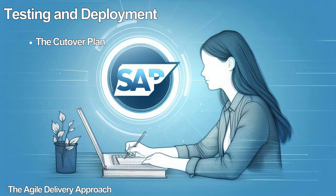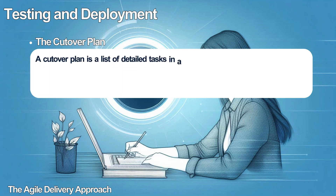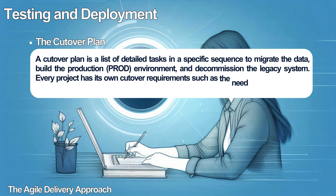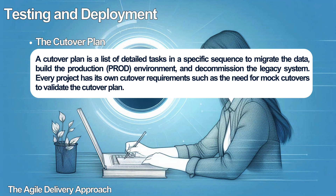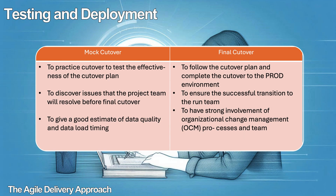The cutover plan becomes very important as you approach deployment. A cutover plan is a list of detailed tasks in a specific sequence to migrate the data, build the production environment, and decommission the legacy system. Every project has its own cutover requirements, such as the need for mock cutovers to validate the cutover plan. The new system is ready with all required business functionalities, but the cutover plan — prepared during the prepare phase and fine-tuned during the realize phase — may make or break the new system. It is common practice to have a mock cutover and a final cutover. The mock cutover allows a practice run to test the effectiveness of the plan, while the final cutover allows the team to follow the plan and complete the cutover to the production environment.